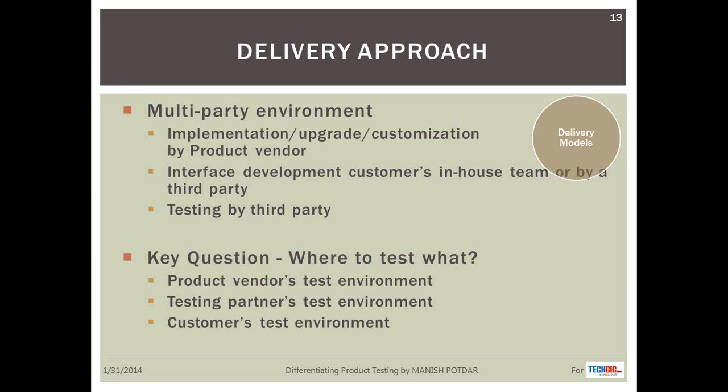You can speed up a lot of testing effort, or in fact the whole life cycle effort itself, or implementation effort itself. But from a testing standpoint, you can look at early testing of the product in the product vendor's environment itself, or you can look at fixing the defects in an offline mode without having the tri-party trials all the time. So engaging with partners and creating a healthy multi-party environment again would form a key to success.